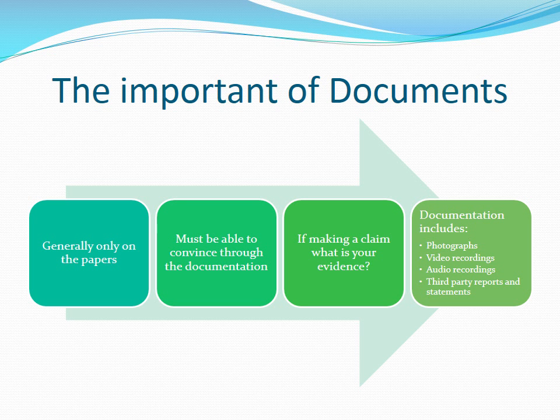Security of payment is a process where information is given by way of documentation. Normally, this is written documentation, but it may include photos, images, audio and video recordings, and third-party documents. As you are trying to convince a person you will never see to make a decision in your favour, you must provide two things in your documentation: the reason or logic of your view, in other words your argument, and then support this reason with independent evidence, which will normally be appended or referenced documentation.